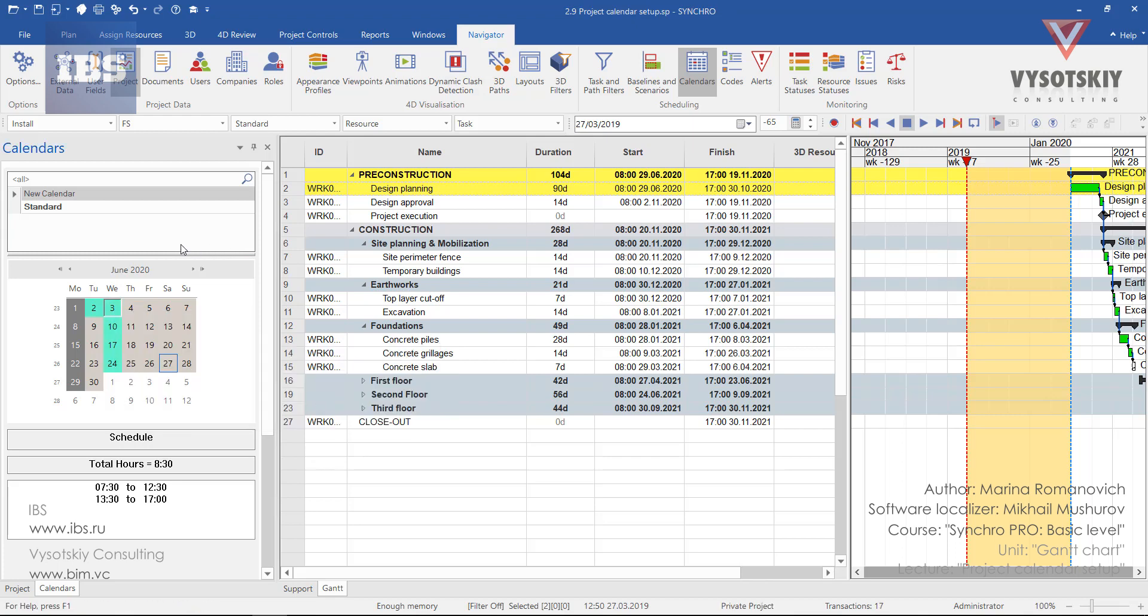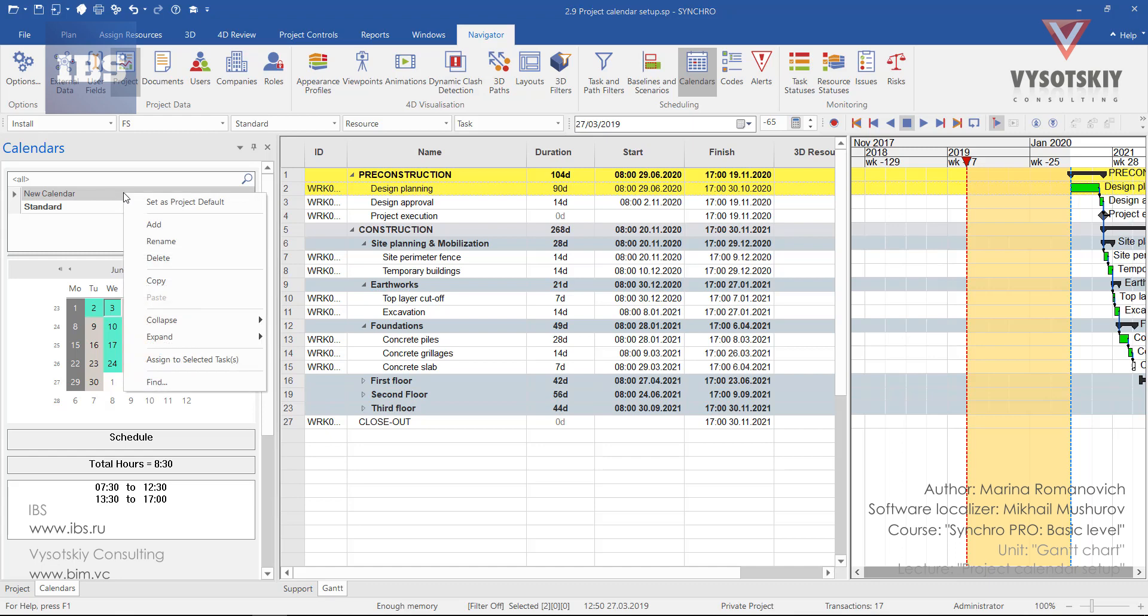In order to set this calendar as a default for newly created tasks, make a right-click over new calendar and select set as a project default.